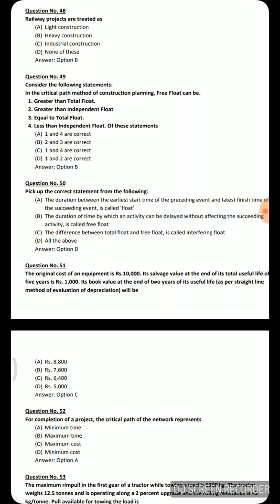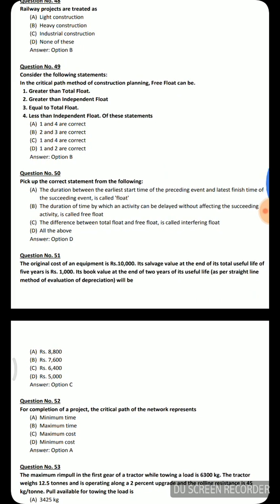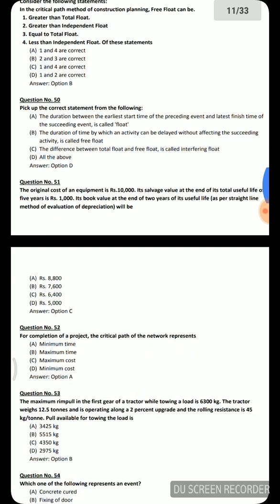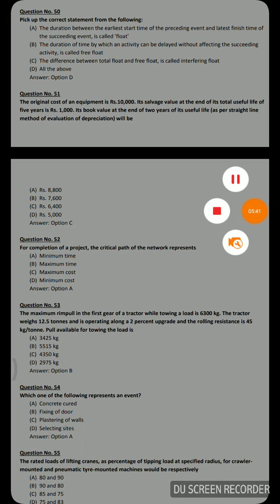Next question — pick up the correct statement from the following: the duration between the earliest start time of the preceding event and the latest finish time of the succeeding event is called float; the duration by which an activity can be delayed without affecting the succeeding activity is called free float; the difference between total float and free float is called interfering float. All three options are correct, so the answer is option D — all of the above.